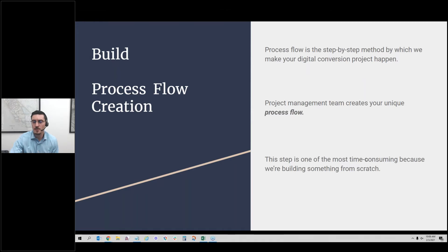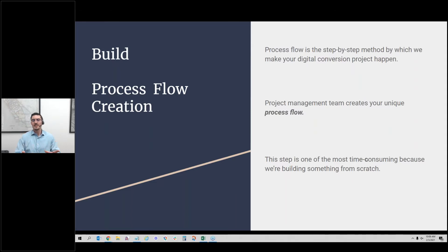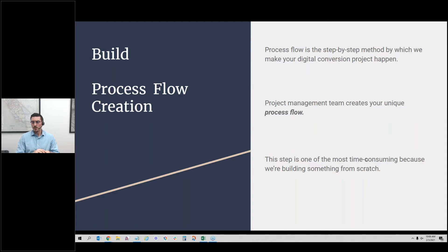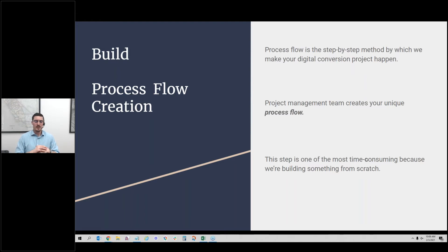The build step is one of the most time-consuming because we're really building from scratch. There can be templates or experiences from other projects, but there's always something unique to that client and that material. The M1 as a whole is usually about three to four weeks long. It can be shorter if you need it quicker, and sometimes longer if it's really complex, but it's about three to four weeks because we're starting from scratch and making a new process flow for you.